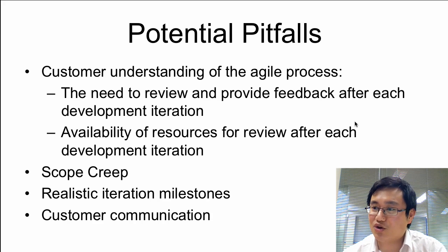This is not to say that all changes to functionality should be rejected, but any expansion in functionality or project scope should be weighed against the time and budget constraints. If the customer insists on scope expansions that will cause the project to fall behind schedule, then the stakeholders must be informed of the consequences, and there must be a thorough process to document significant changes in scope.